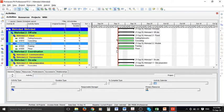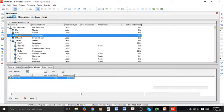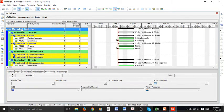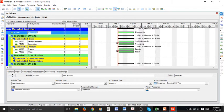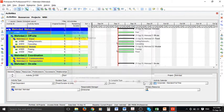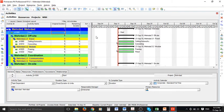So I can go ahead in the activities tab and select my project, add a new activity and I can name this one start or project start. This activity is now in here. By default the duration is five days. I want this to be an event so the duration should be zero, and as you can see in the Gantt chart view now I have this event.